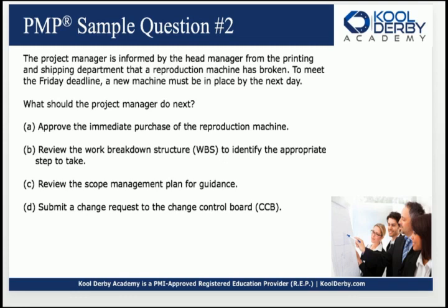So you notice here that C, Charlie, is a great answer, because that's what we should do, go to the scope management plan. However, the best answer is what's going to be included in the scope management plan, and that is the process for a change request, based on what the change control board will do. They make a recommendation, and they will consult with the customer and the proper people to give you the funding if necessary. And you're saying, well, that's a process, that's going to take a long time.